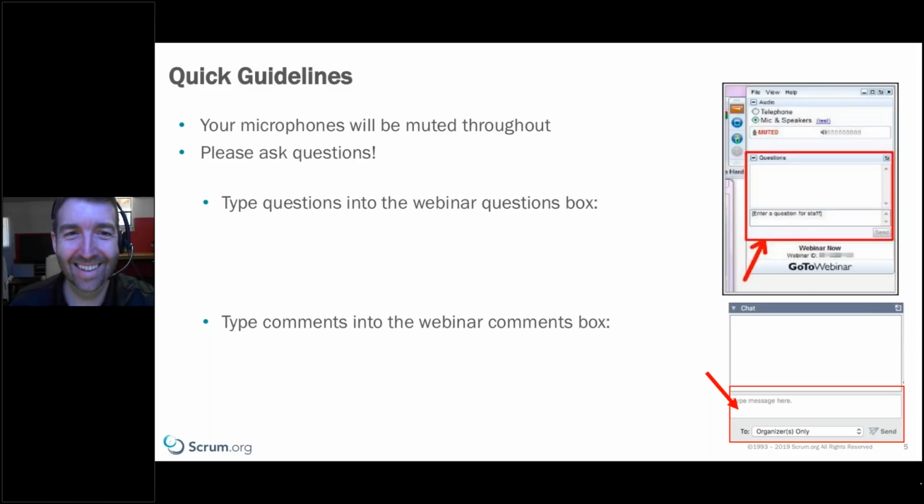I agree. The thing I also do is I caveat that, right? Because metrics for my team may be very different than metrics for your team, even though we're delivering the same amount. And this is where you need to caveat all of that, because each team's estimating on their own. So a 1 to me might be a 3 to you, which might be a 5 to another team. Right.